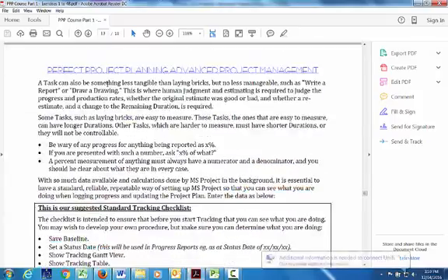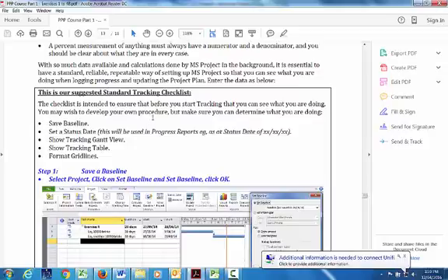So what's required? Basically we're going to role play that a project started on Monday, and then the following Monday in the afternoon we'll review the status of the project. We'll use lay 10,000 bricks, lay another 10,000 bricks, so Bob the Bricky project. To do this, a couple of steps. Once we've created the plan, we agree that this is the plan that we'll work to, and it becomes our baseline. We then need to set a status date. That's the day that we inspect the project and review where the tasks have got to. We can show this data in a tracking Gantt chart view, and we work with a tracking table. Formatting grid lines is basically this little line here, so you can see it on that page. So that's the status date, when things are getting reviewed. Okay, so let's go ahead and do that.